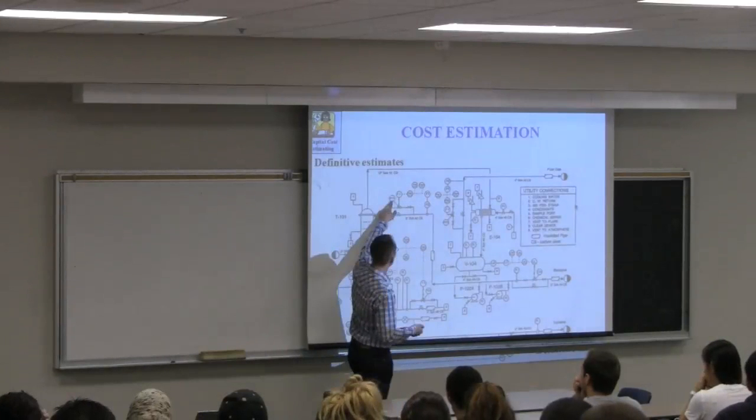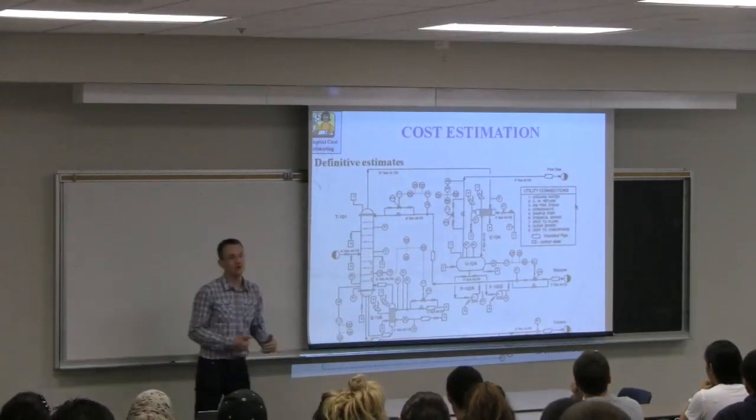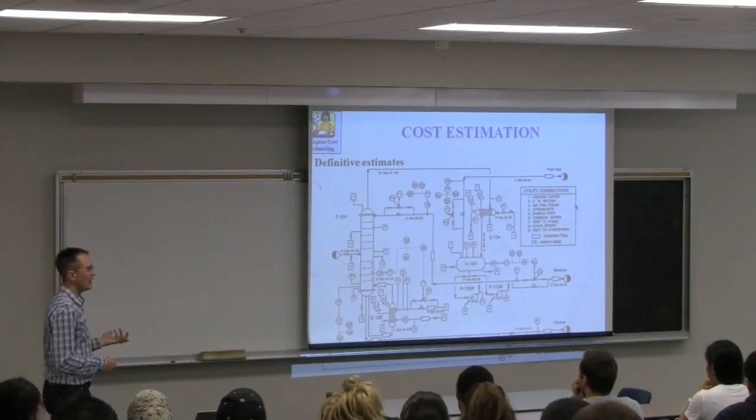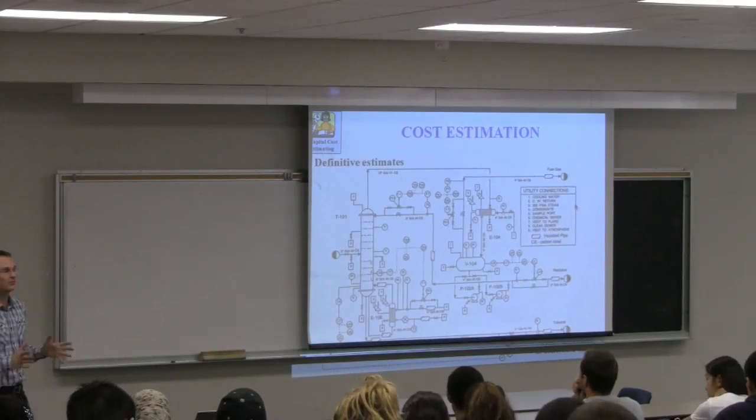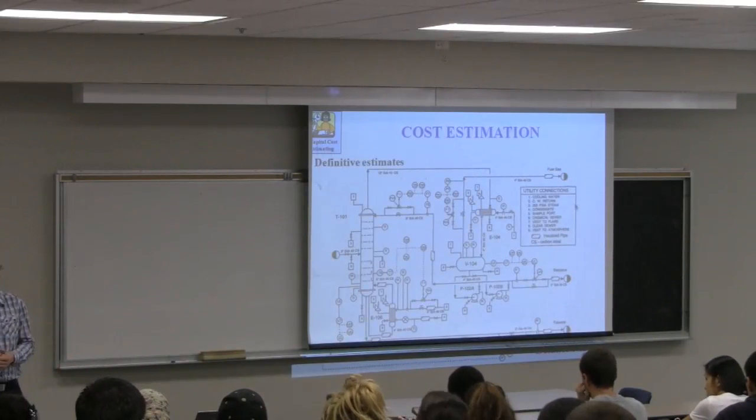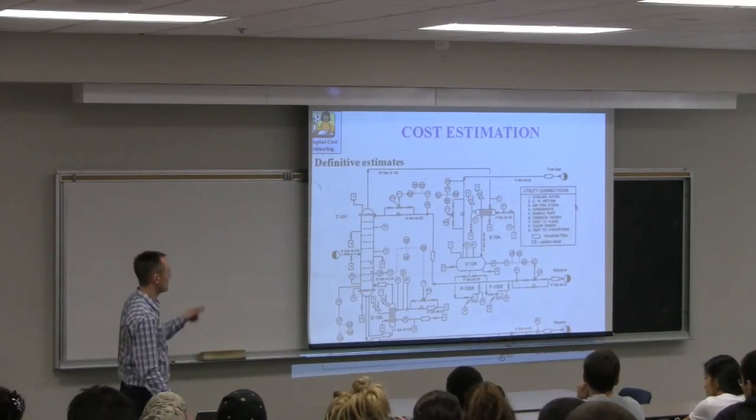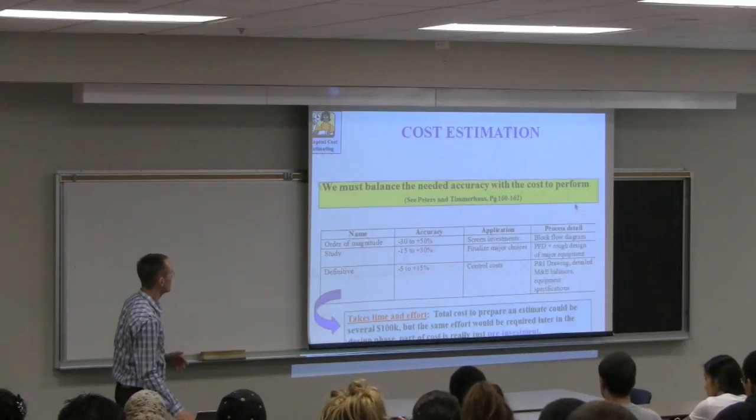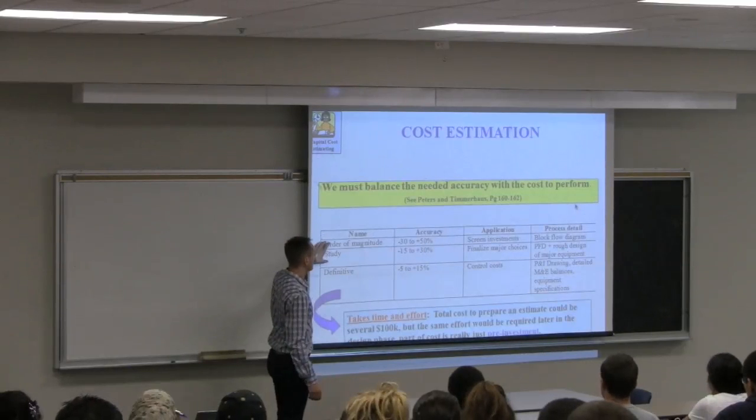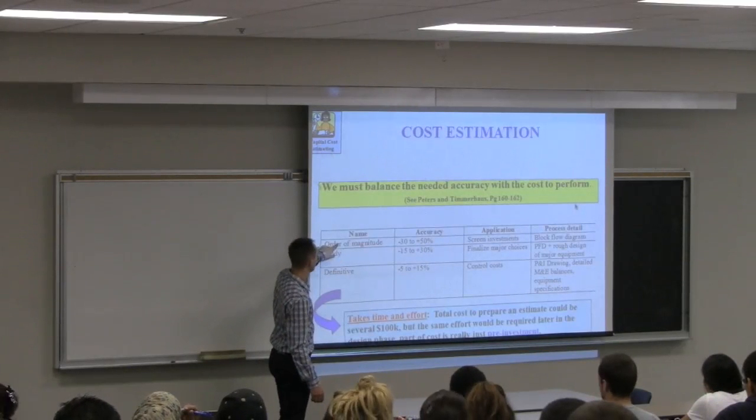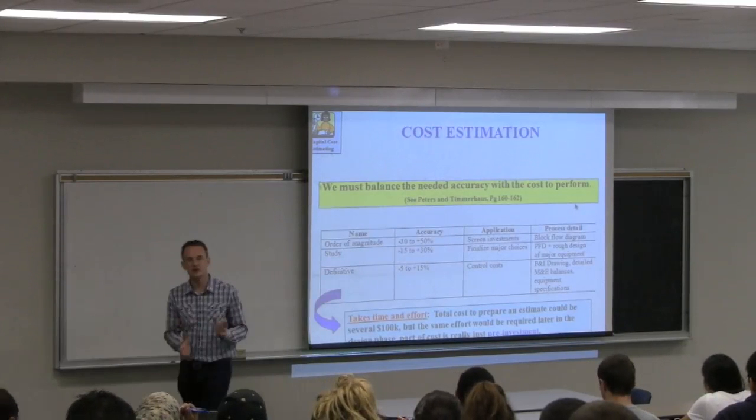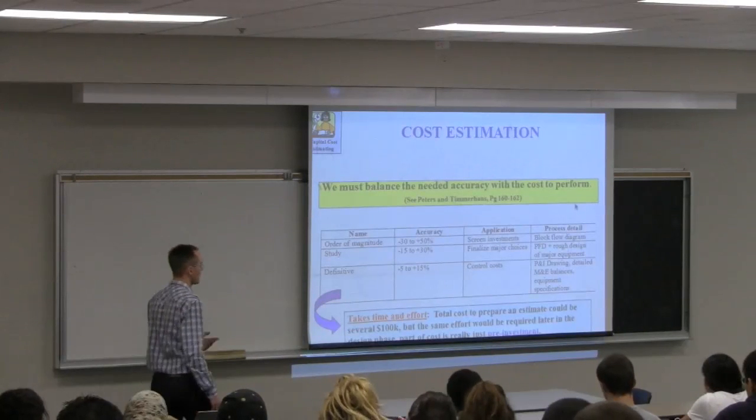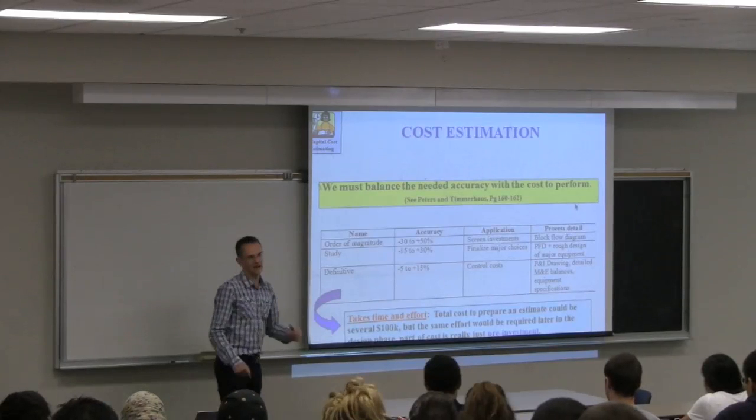We will see this when we start to look at startup and shutdown and troubleshooting of the process. All this detail here on the different control loops are going to be critical when we're looking at safety and instrumentation to handle safety issues around the process, and also how does this instrumentation react when things go wrong. But for capital cost estimation, we're going to look at somewhere between an order of magnitude and a study estimate. We want estimates that are pretty much within 30% of our final cost. The definitive estimate, required for construction, we won't get to that level of accuracy in this course.